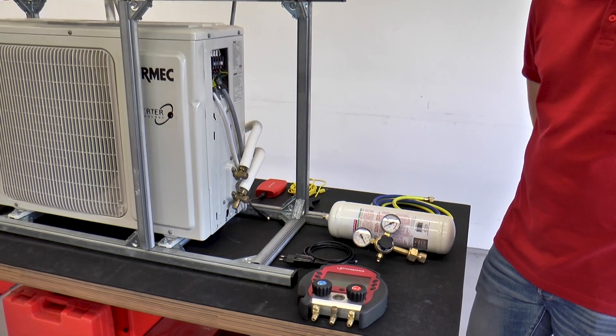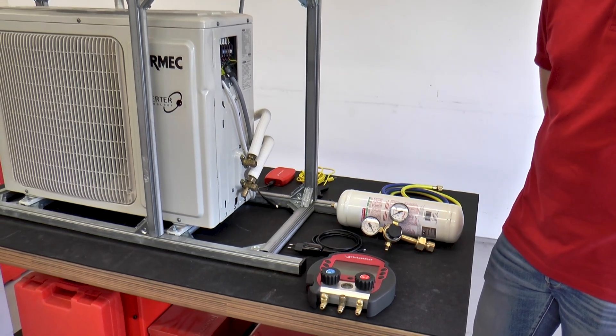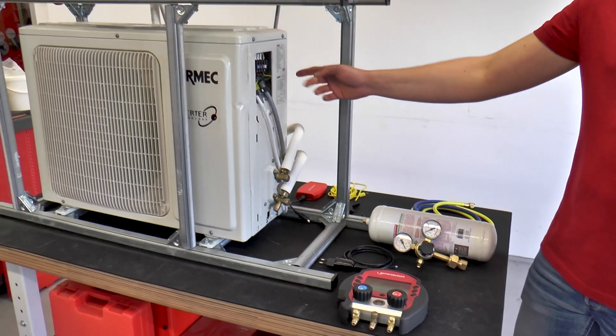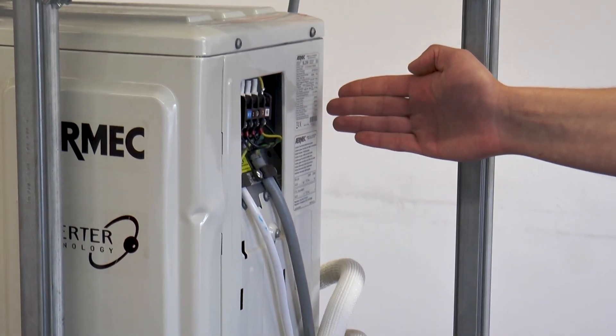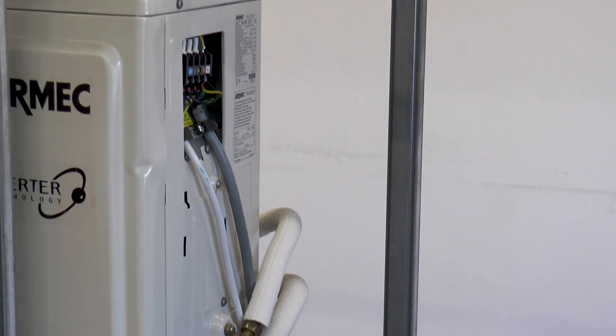The first step of the commissioning is the load test to maximum pressure. The maximum pressure of a system can be found on the manufacturer's specification plate. In this case it is indicated as 43 bar.